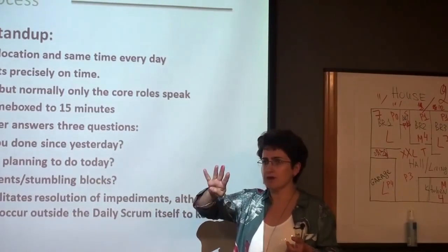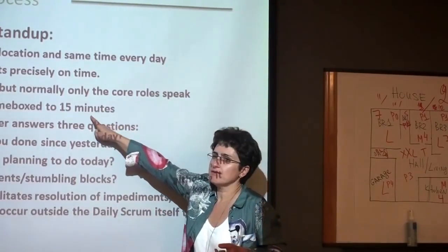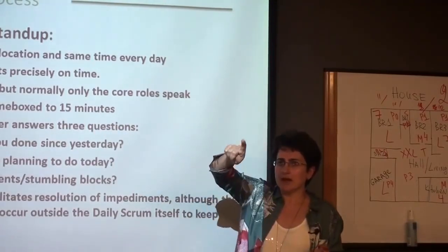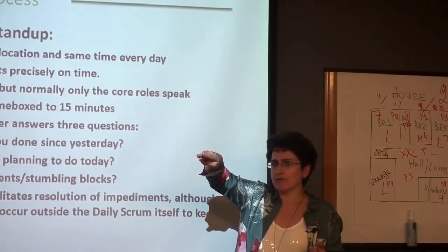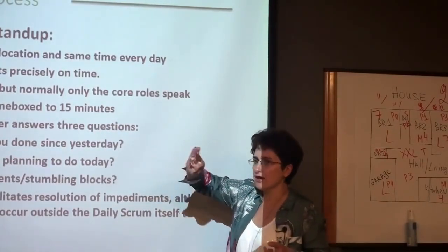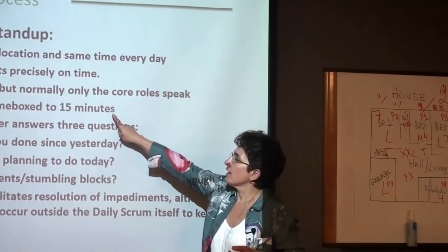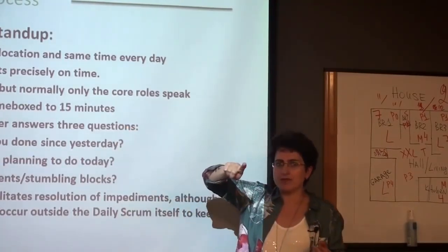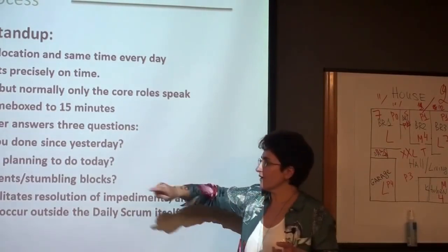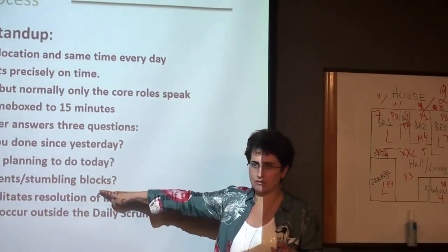And if you have only 5 people in a team and you have 15 minutes, right? 2 people are the Scrum Master and the product owner. If they don't have too much to say, you have 2 developers, 1 tester, and you have 15 minutes. Each person has 5 minutes to talk. So 5 minutes is enough to briefly answer those questions.